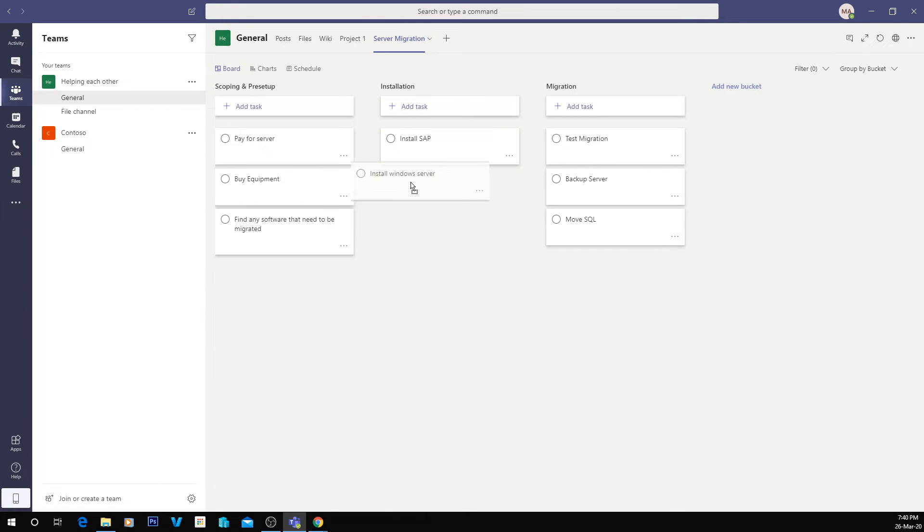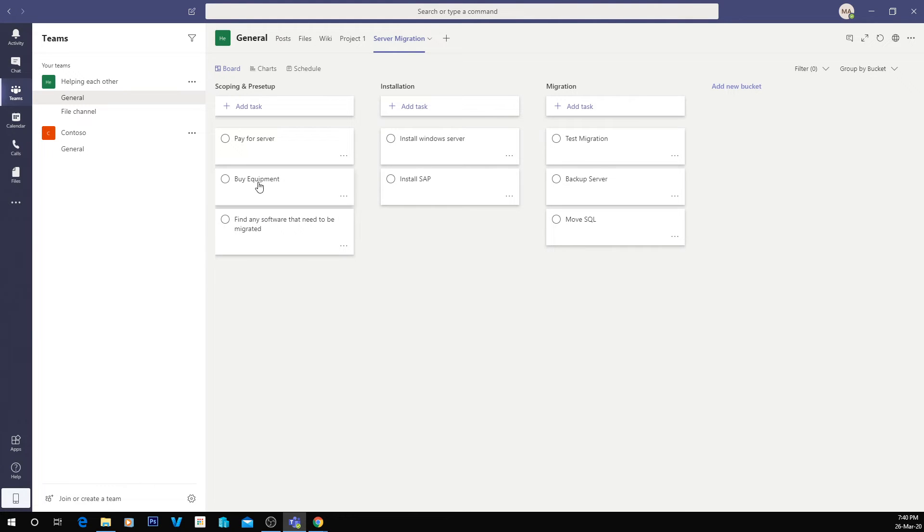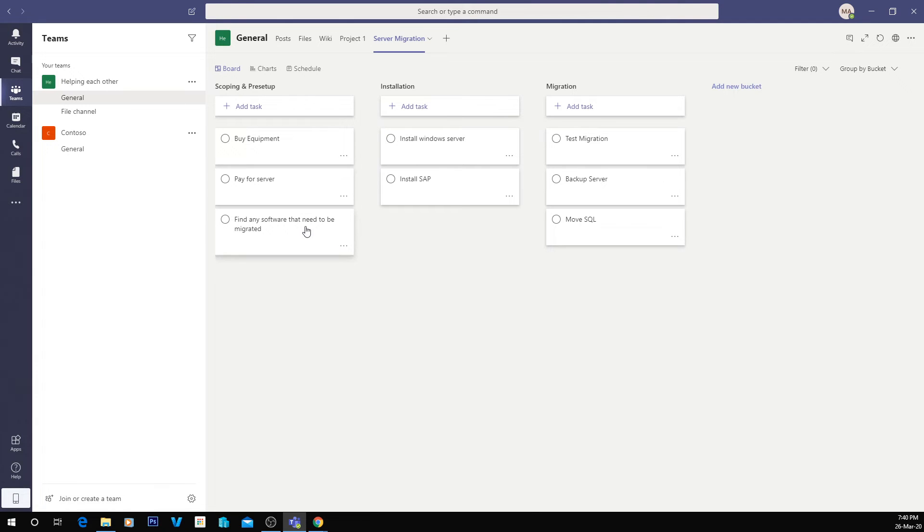So as you can see, you can move the tasks and then what we can do also is we can reorder these tasks. So as you can see, it's going to be hard to pay for the server and buy for the equipment, but what we're going to do, we're going to buy the equipment first and then pay for it afterwards. And find any software that needs to be migrated, so that's part of our scoping.